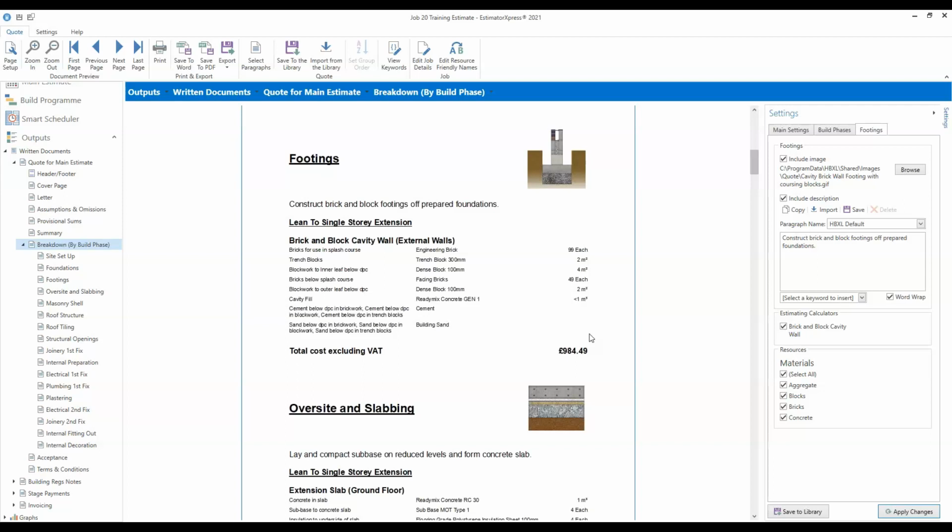And it comes back to what we were saying about inflation as well. If you're factoring inflation into your quote, it's going to make it more expensive, fact. But if you're very open with your customer about that, and you say, yes, this quote might be more expensive than Joe Blogs Builders down the road, but that's because I'm quoting you based on what prices are likely to be in 6 months' time, and this is realistic of what you're going to have to pay.